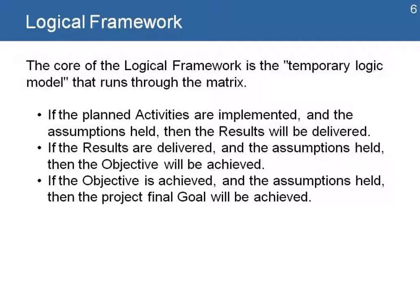The core of the logical framework is the causal logic model that runs through the matrix. It goes like this: if the planned activities are implemented and assumptions hold, then results will be delivered. If the results are delivered and the assumptions hold, then the objective will be achieved. If the objective is achieved and the assumptions hold, then the project goal will be achieved.